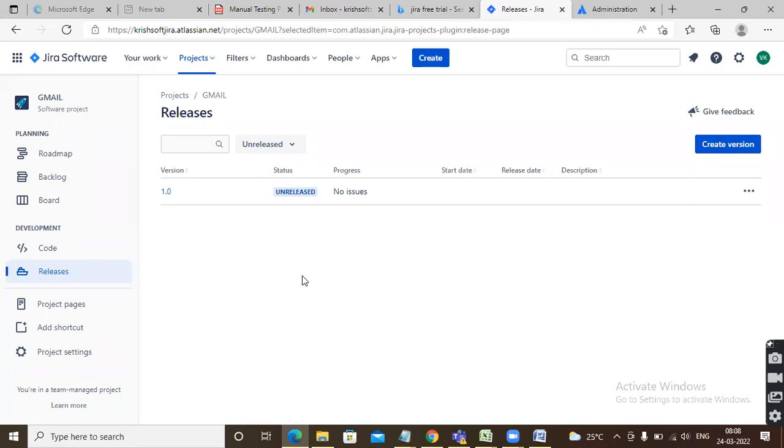Entire product level, what are all the user stories that are pending, that is product backlog. Release backlog: for that release, what user stories we are considering. Sprint backlog: for that sprint, what are all the user stories we are targeting. So this way it is going to work, guys. Next, we are going to create the user stories now. Please try to understand carefully.